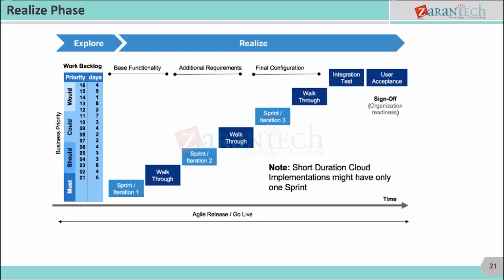So like that, you are giving the business a chance to visualize at various stages. They are also involved in the project design at every level. And if there are any design level understanding issues, they can be identified at a very early stage. It's not that you design something completely and then they say, no, this is not what I'm expecting. So it doesn't come across such situations. So that's an agile based process.